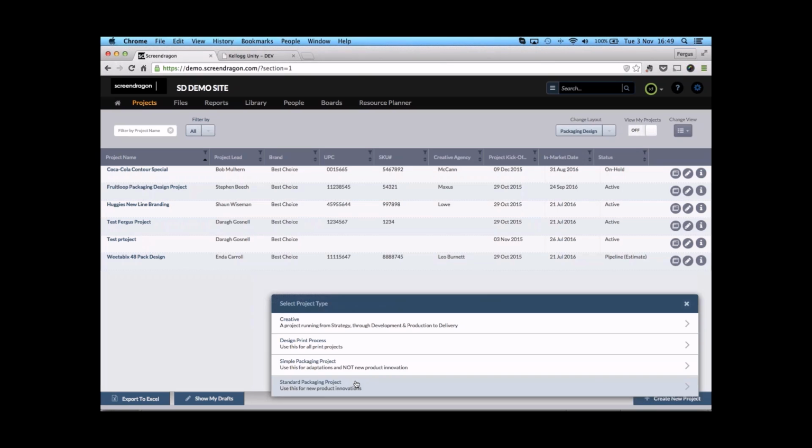I think we accept up to 20%, but if it goes over 50 or 40, it's flagged to a senior vice president and asked them to fill in I think it may be a business case, or certainly to improve the extra financial cost to the organization.